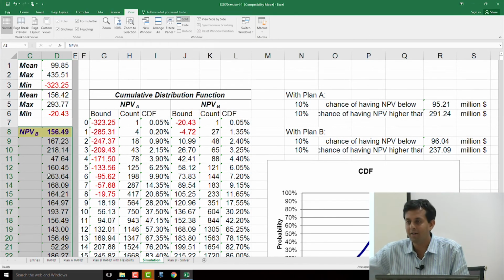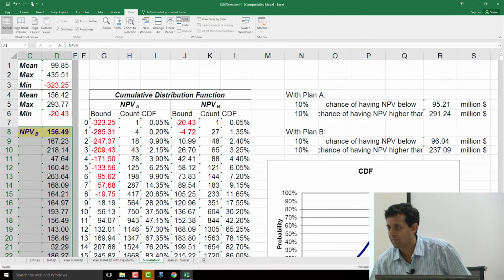Build as demand develops, right? So this is one kind of flexibility. We also talked about the parking garage example in class. You build 3 stories, then when demand picks up, build 4, build 5, build 6, or whatever you want. But don't necessarily build 6 and then just hope that demand will pick up.